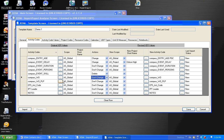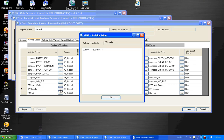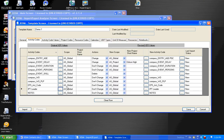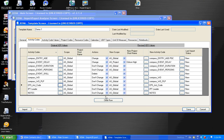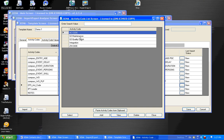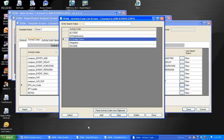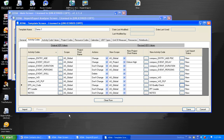I'll just go over some of these other buttons on this screen. The button to the right of this activity code will list out any activity code values for that activity code. The button to the right of the project will list out any projects, which I just showed a few moments ago. And this last button to the right of the new activity code will list out authorized activity codes. And I'll just click on one and show you what I'm talking about. Here we have a list of authorized activity codes that were set up by a Primavera administrator. And this allows us to select from a predefined list. For example, I could select G3 quality check. And that would be populated on this row.